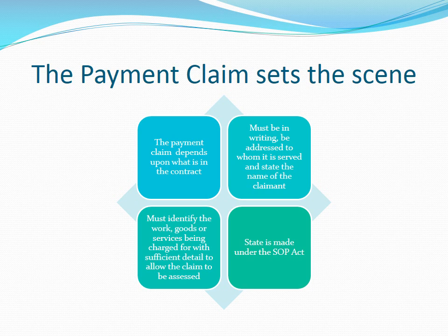The payment claim is the document that starts the security of payment process. When you send the payment claim out, you should understand why you have claimed the amount you've claimed, how that amount is calculated, and what evidence you will rely on to prove your claim. If this is not the case, then you do not really know why you are entitled to make the claim.